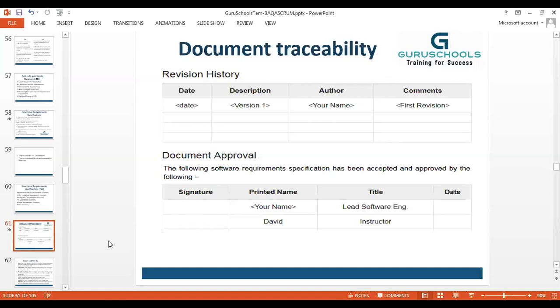So as a BA, I would really request you to understand traceability. We talked about traceability quite a few times. This traceability starts with a requirement, which can be a single bulleted point from a mail coming from my client saying I need to have my attendance management system improved, right? It's a single thing, but the implementation of it can go up to 20 or 30 odd different points in an SRS, and it can lead to 300 odd points in the FRS. I'm trying to evolve the requirement, I'm trying to elicit the requirement from a client to a development team, and I should prevent all the leaks, all the missed elements, and assume the least possible thing. And that's how I build the traceability one by one.